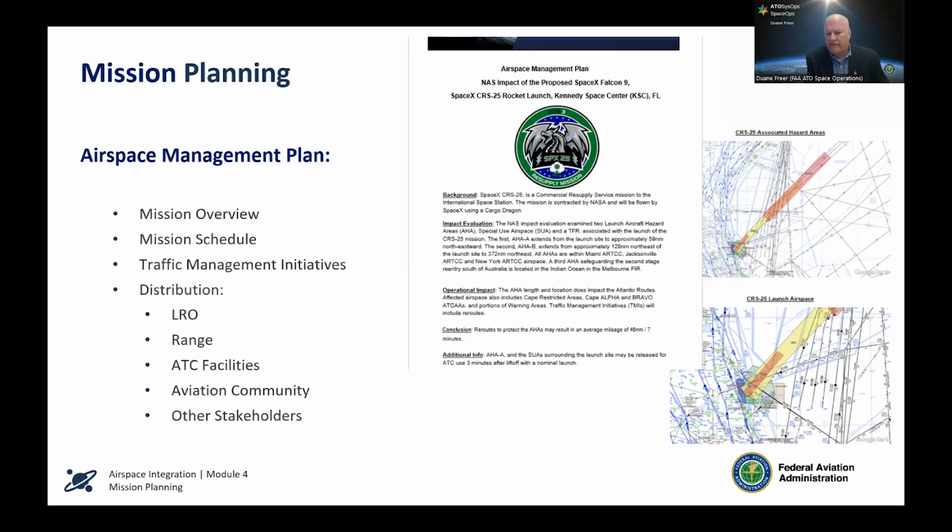So you'll quite often see in a NOTAM that primary date with the hazard area window for that primary date, but then you'll also see successive dates, quite typically 5 to 6 successive dates, and typically those times will move depending on the type of mission that's being performed, but you'll see those additional times also. So it's done virtually at the same time, and then we will message out in real time if there's a scrub and a move to a backup date.